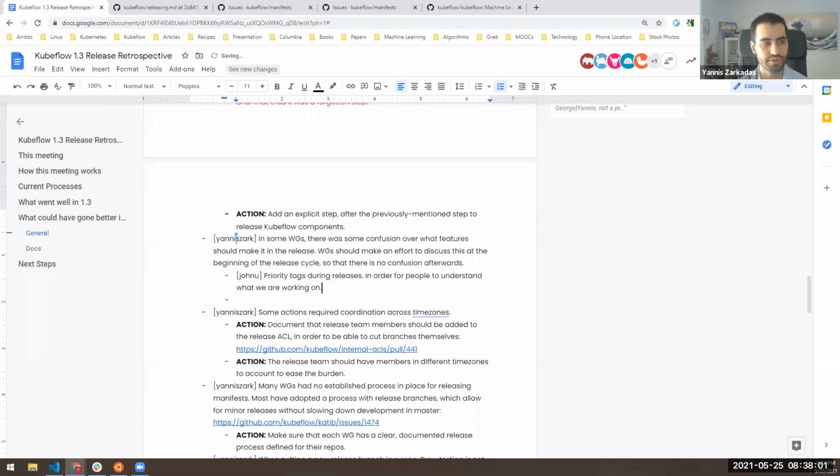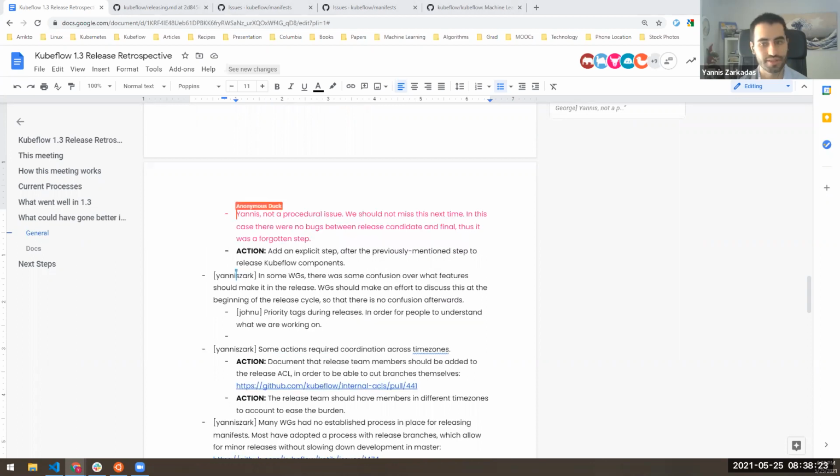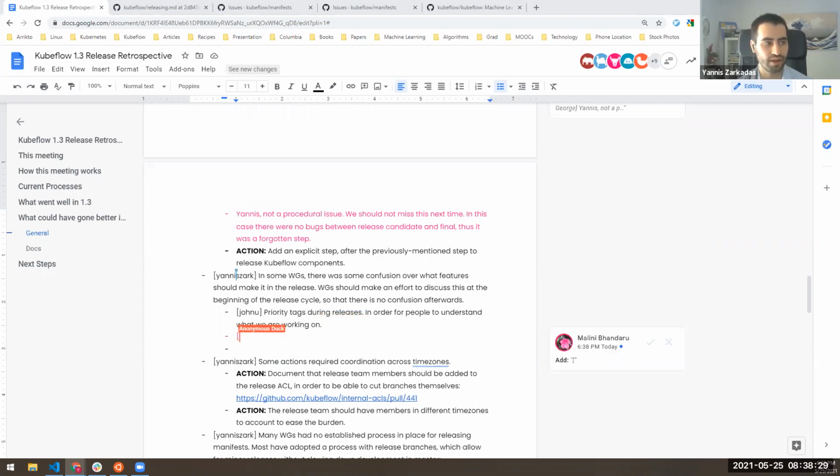Thanks a lot, John. Yes, I actually remember that Jeremy was using that method. What I remember from this method, though, is that it was helpful when we were at the end of the release, because we just needed to make a quick decision about everything, and whatever would go in was P0, everything else was P something other than 0. But I remember also that there were a lot of issues that were P1, so it was not clear in its release which would get worked on, or at least which we planned to get in for that release. I don't know if you remember the same experience.